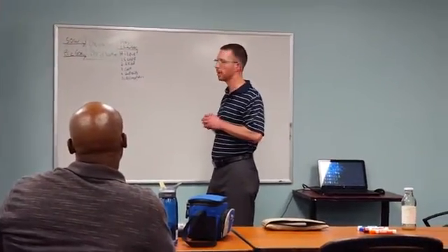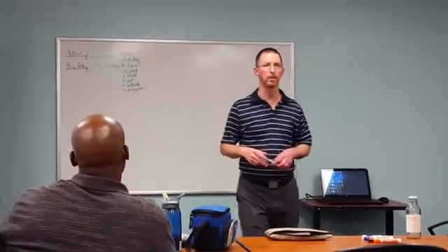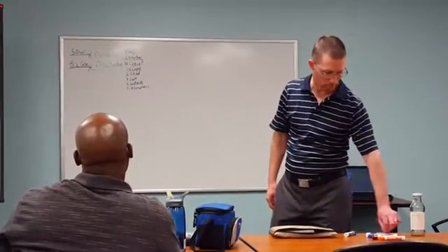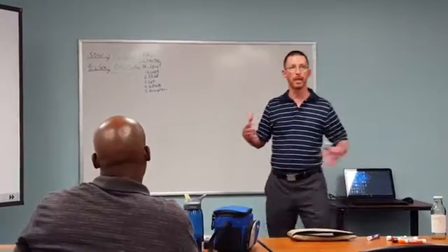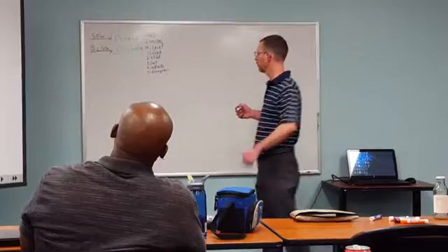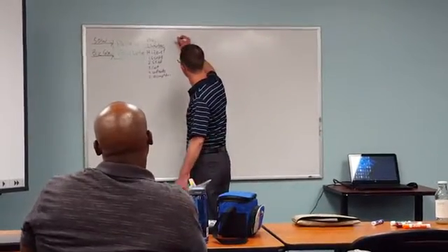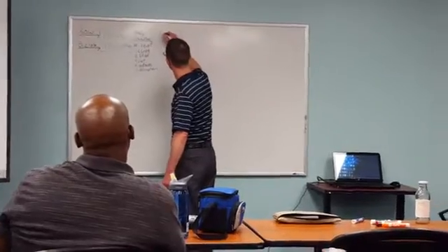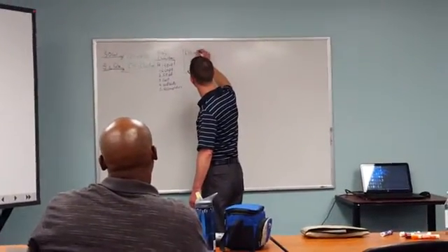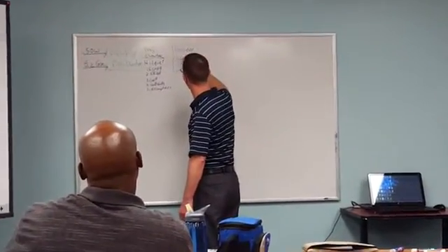Okay, so once I get the project charter created, that's our starting point for the project. But since it's high level, I need to plan everything. I need to plan it in detail. So I'm going to create a project management plan, and the charter is going to be the key input there for a planning process called develop PM plan.